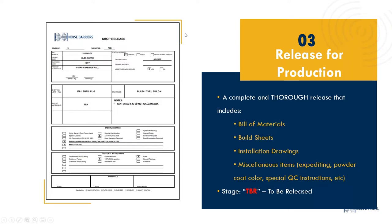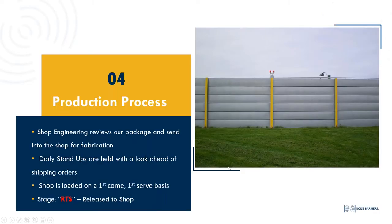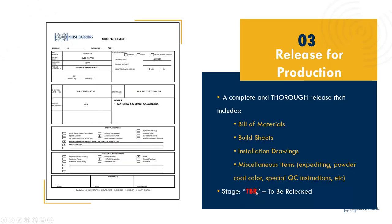While we are working on this release document — which currently takes about eight to ten business days to complete — we call the job 'TBR,' meaning 'To Be Released.' That is what we designate while our designer is working on the release package and getting it ready to be sent to the shop.